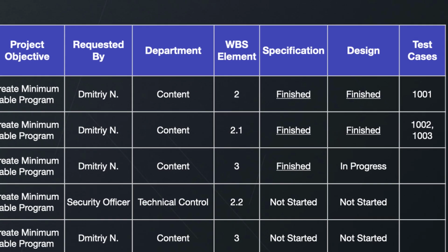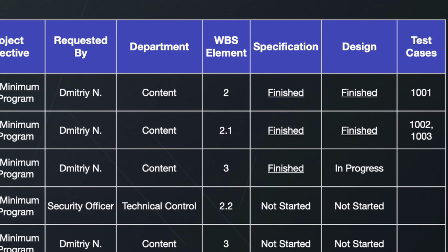Then we also have connection between a requirement and a WBS element. From one side, by connecting these dots, you'll ensure that you don't forget to implement some of the requirements. And you do know the saying, what is not in the work breakdown structure is not a part of the project. And on the other hand, there won't be a scope creep.